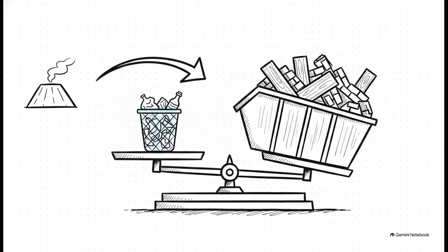So, their response indicator? It was as simple as weighing the general waste skip against the recyclable timber skip. Their strict response criteria stated that the recyclable skip literally had to be at least 9 times heavier than the general waste skip during that specific construction stage.